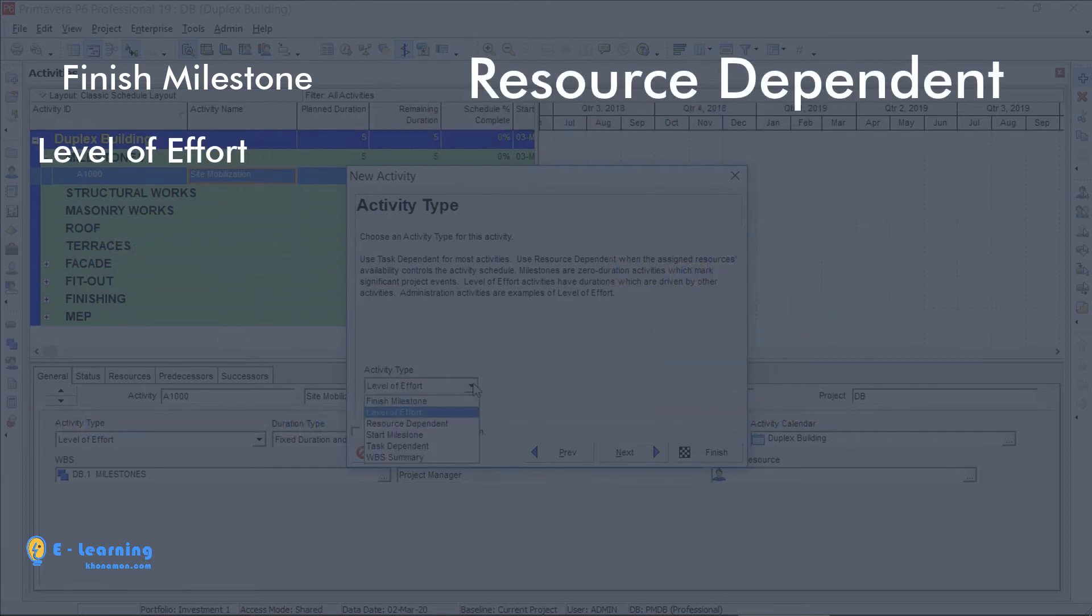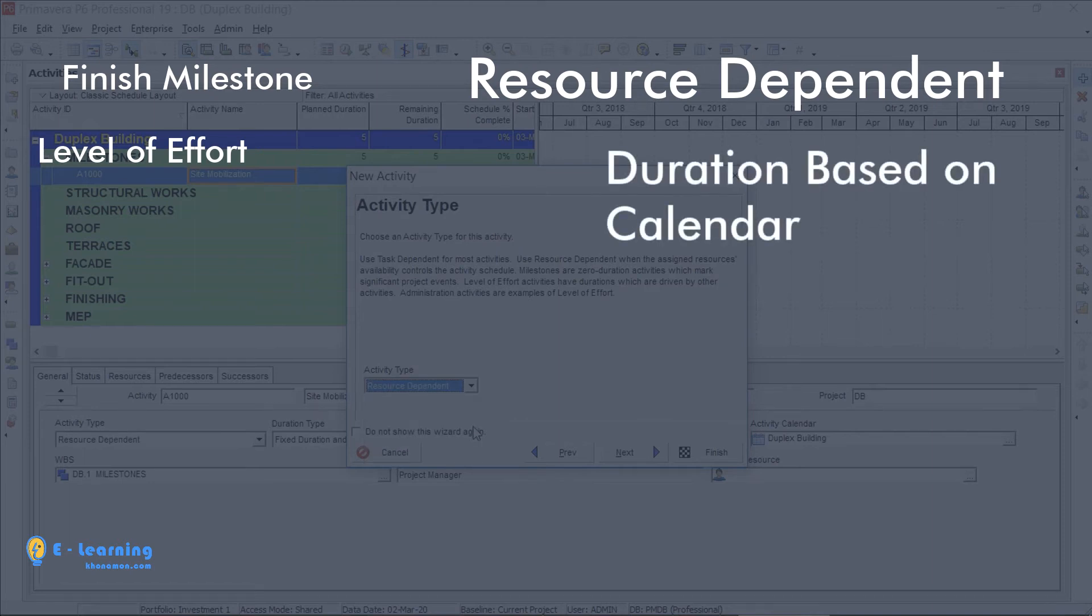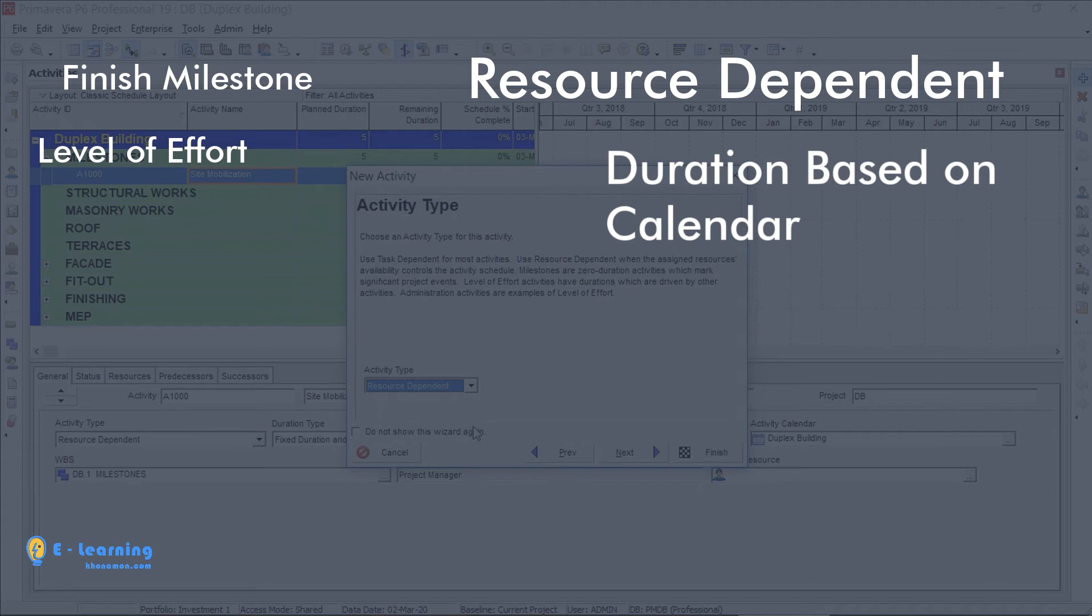Resource-dependent activity gets its working days from calendar. So its duration is set upon the calendar of which the resources are assigned to it.